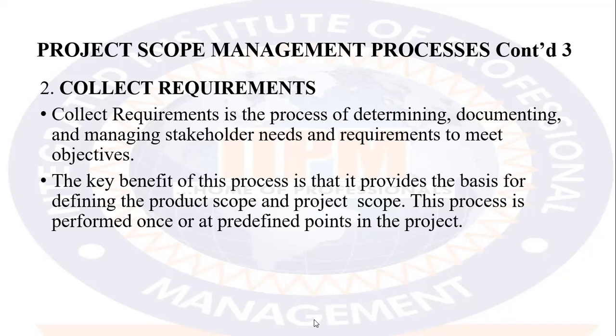Now, the question of when they get to issue you a charter. A charter is only issued after the final scope of the project has been agreed on. That's when they now issue you a charter. You made your presentation. They say, oh, your presentation was good. Why don't you put this? Why don't you put that? And then submit your technical document. Then you made all those corrections that they want and submitted your technical document. They read through it and they feel, oh, this is what we want. It is after they have accepted the proposed work that they now give you a charter with the financial inclusion coming into place.